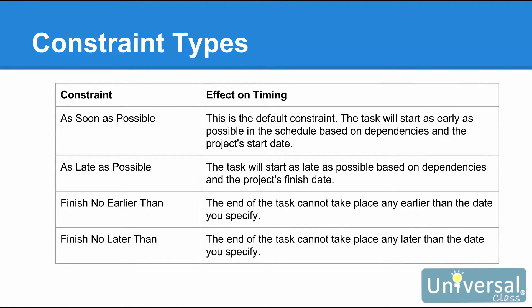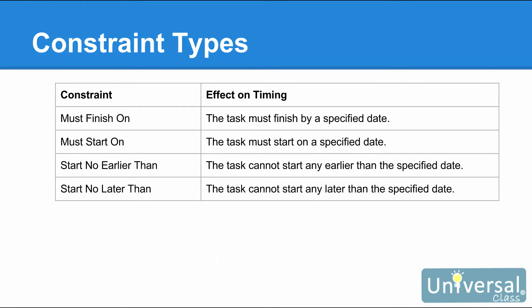Before we teach you how to apply constraints, let's look at the possible constraints you can put on a task. As Soon As Possible is the default constraint — it will start as early as possible based on dependencies and the project's start date. As Late As Possible means the task will start as late as possible. Finish No Earlier Than means the end of the task cannot take place earlier than the date you specify. Finish No Later Than means the end cannot be any later than the date you specify. Must Finish On means the task must finish by a specified date. Must Start On means the task must start on a specified date. Start No Earlier Than means the task cannot start earlier than the specified date. Start No Later Than means the task can't start any later than the date you specify.